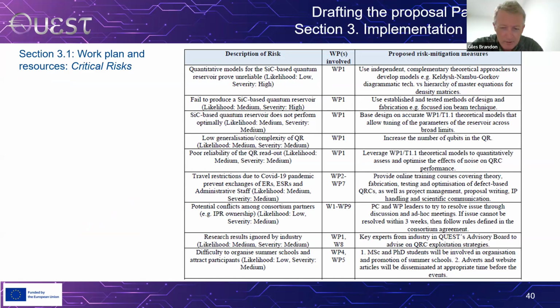The main recommendation I would make here is, for each of your work package leaders, at the same time as you ask them to write their work package description and the text for their objective that goes in section 1, you should also say to them, look, you need to identify at least 2 specific risks relating to your work package. Not only identify the risks, but also identify specific mitigation measures that can be taken to address them. As I say, at least 2.